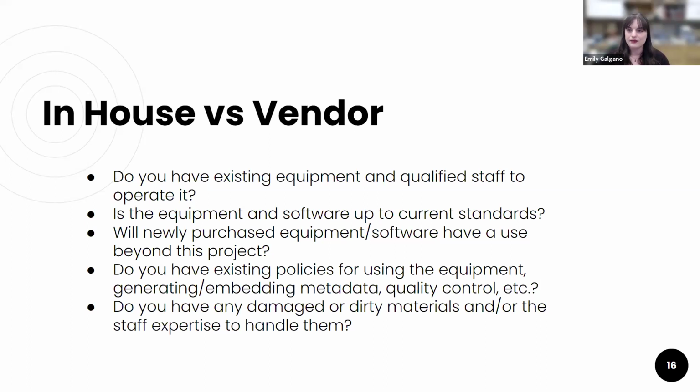Our workspace is limited. We have a very small workroom, and we didn't want to add more and more types of equipment that had less than a 5 to 10 year lifespan of use. And lastly, staff time. We are a very small department of a much larger institution. There's only 3 positions in the Archives and Collections department, and I'm the only one of those that focuses on the archive side of things rather than the objects. Realistically, I would not have been able to spend all day every day scanning photographs, even if we did purchase a high-speed overhead scanner to make the process go faster.